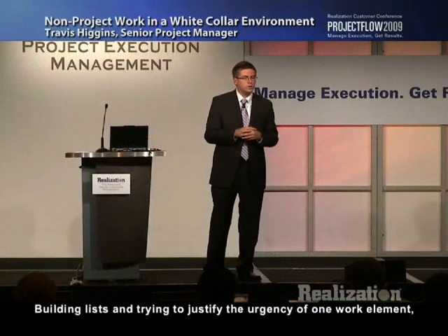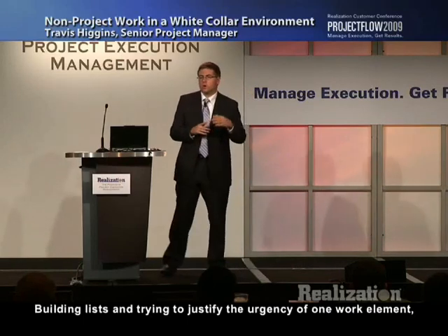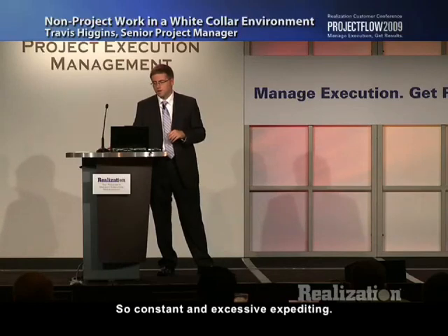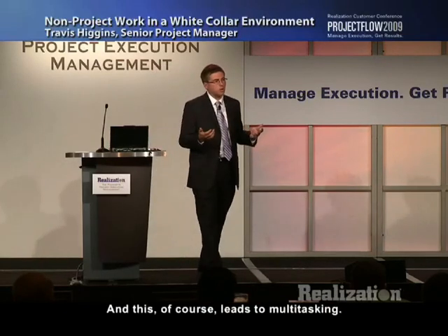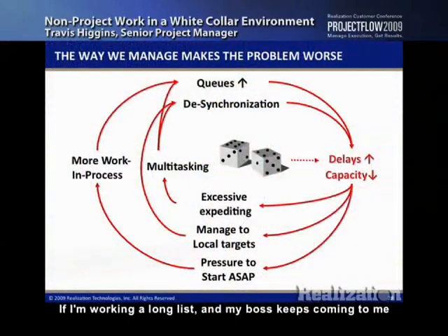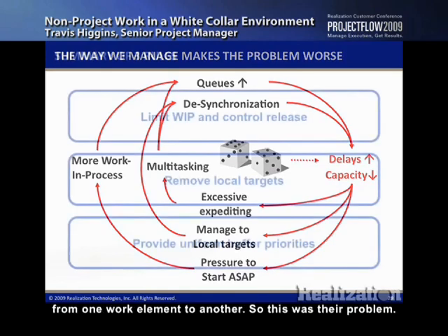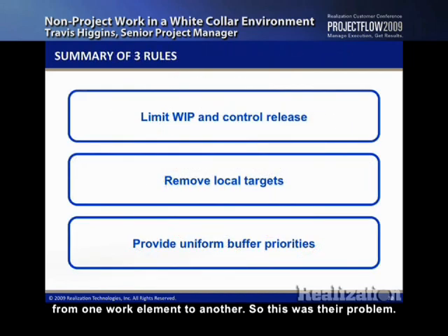Building lists and trying to justify the urgency of one work element, one piece of material over another. So constant and excessive expediting. And this, of course, leads to multitasking. If I'm working a long list and my boss keeps coming to me day after day and having me jump around the list based on whatever fire is hot today, then that's going to cause multitasking. And then, of course, that leads into desynchronization and queues. It compounds that issue if our people are bouncing around from one work element to another. So this was their problem.